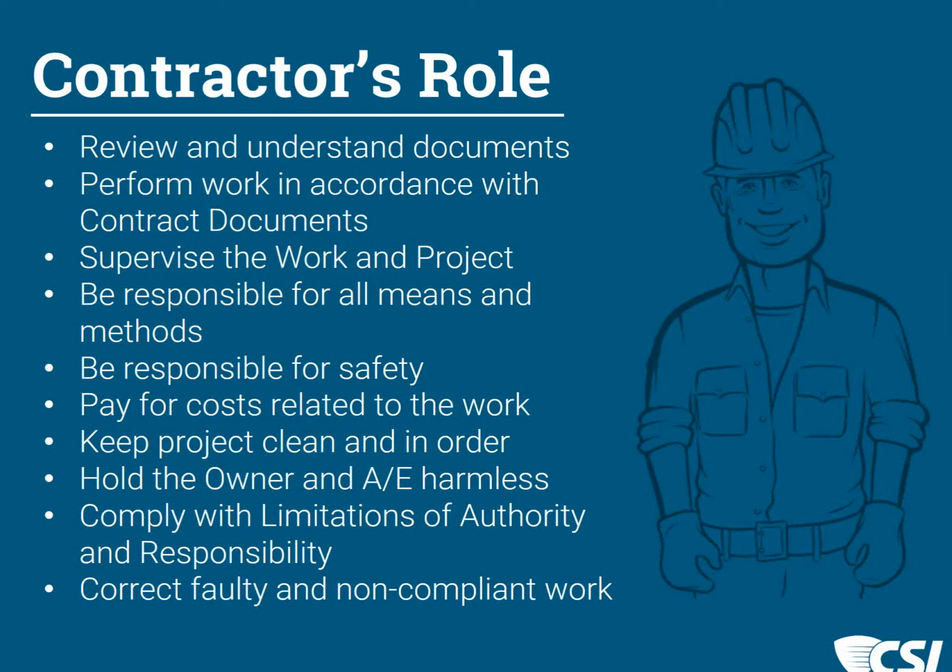If there are any errors or omissions, they note those during their review and forward any kind of conflict to the architect or engineer for review and for coordination and correction or supplemental information that they may need, an interpretation to clarify that.